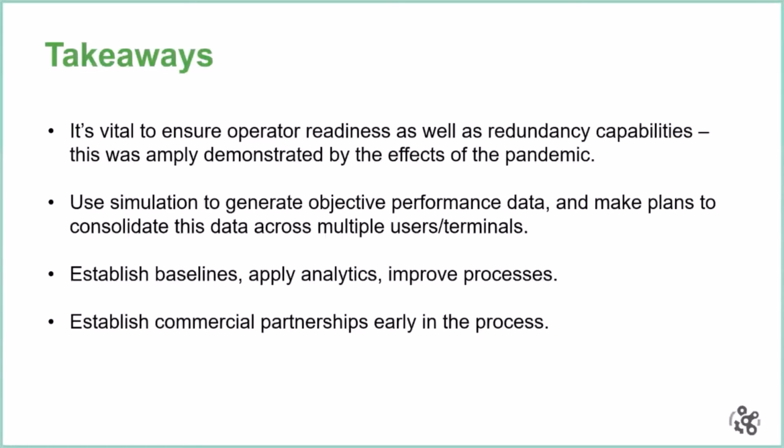There are experiences on the West Coast of the US, mainly California, where the reduction of personnel has been zero because of labor relations, and so this is something that needs to be taken into account. In the return on investment, the reduction of labor is nil or very low if we only base it on the cost saving of labor. So this is a few words of advice that I could give to people looking into automation.